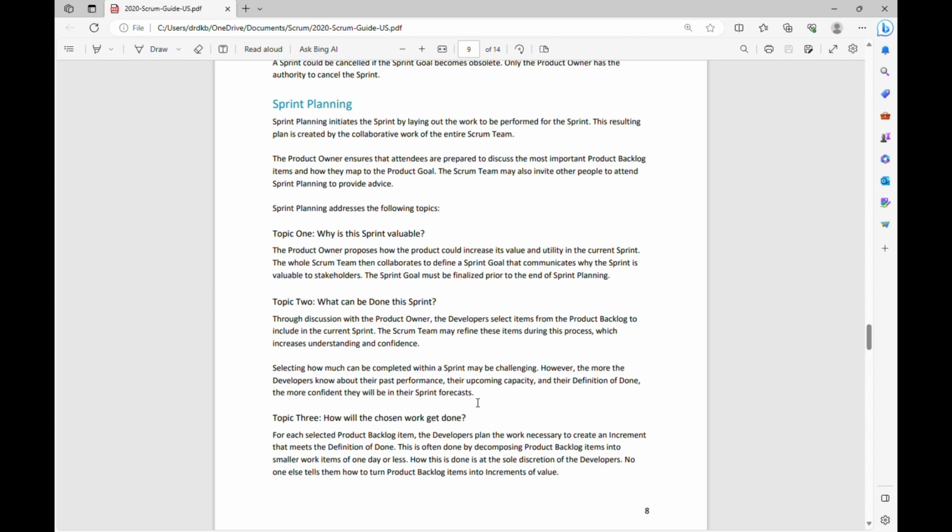So estimation is never a guarantee or commitment. The estimate represents the product backlog items chosen by the Scrum team that they think they can finish by the end of the sprint. So, for estimation, the team can consider their past performance, which refers to the amount of work completed by them in the previous sprint, and it is generally measured in story points. They also call it velocity.